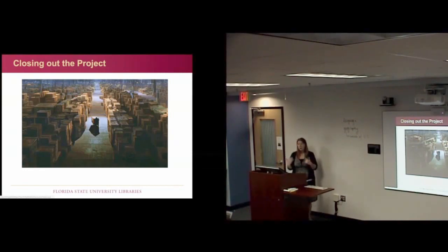And we do that for two reasons. One, so that we can return back to it, because if 3 years down the road we're like, oh, we have another collection with hair in it, what did we do with the last one? We could look back at this project and reference the decisions we made for that. But it's also when you get questions. Why did you make that decision? Why did you do that? We've had that a couple of times with a project we did with the Claude Pepper Diaries. We decided not to digitize blank pages. And we put a little note in there that said, December 1st through 15th are omitted because the pages were blank. We had someone question us on that, like, well, why did you do that? Those pages could be important.